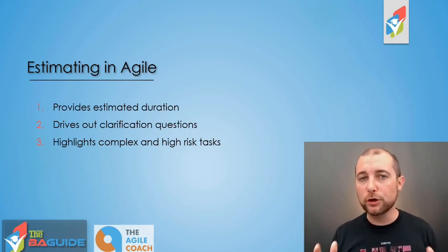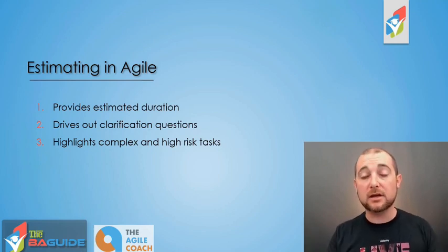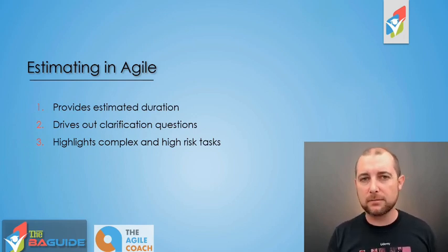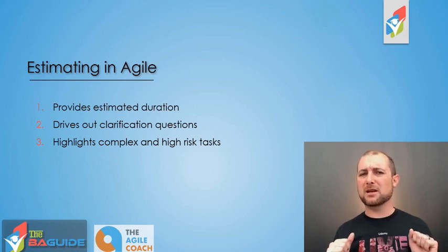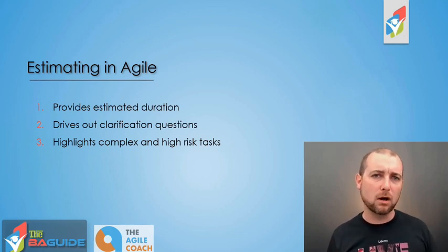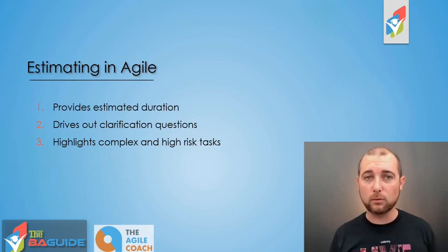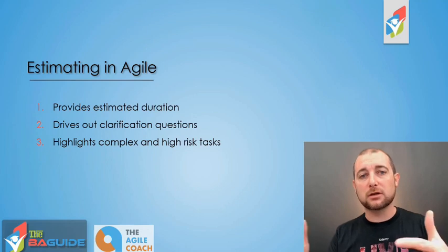Now, that's going to be really useful when you hand that to somebody that's going to be creating it, and then they give you an estimate back and they say, okay, I think this is a medium requirement or medium feature. You may say, wait a minute, I was thinking it was a small, so let's talk through a little bit. What are some of the complexities? What are some of the risk items that made you consider it a medium?